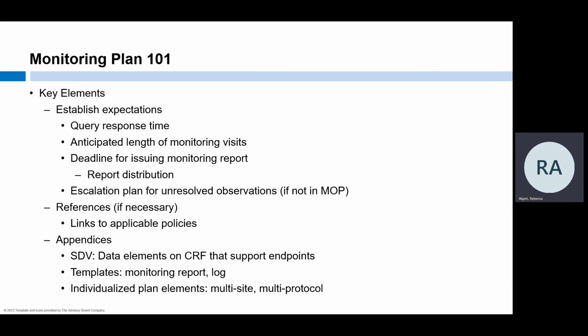Finally, we come to the appendix. This section includes tools and templates that are required in order to carry out the plan as written. If your monitoring plan calls for source data verification on endpoint data or any other specific fields, a copy of the case report forms with those endpoints identified should be included. Templates for the monitoring report and log should be included as well so that these elements are applied consistently.